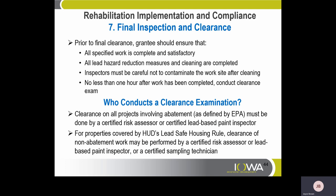Step seven — final inspection and clearance. Prior to final clearance, grantees should ensure that all specified work is complete and satisfactory and all lead hazard reduction measures and cleaning are completed. Inspectors must be careful not to contaminate the work site. No less than one hour after work has been completed, you must conduct your clearance exam. Clearance on all projects involving abatement as defined by EPA must be done by a certified risk assessor or certified lead-based paint inspector. For properties covered by HUD's lead-safe housing rule, clearance of non-abated work may be performed by a certified risk assessor, lead-based paint inspector, or a certified sampling technician.